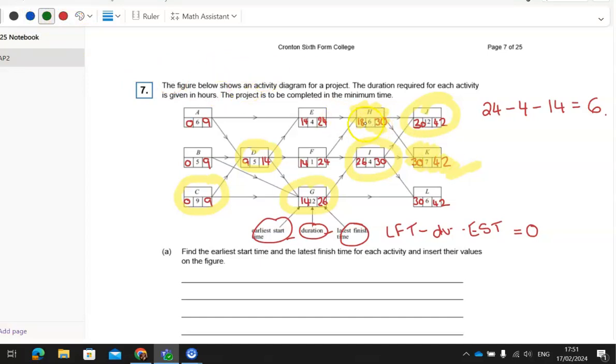Right. So if this overruns by 10, that's now becoming 16. This is becoming 17. So this is going to take 16 now. So the earliest this one can start now is 34. So the earliest all of them can start now is going to be 34, because H, 34, 33, yeah, because that's bigger than the one on the critical path, right? Okay, so the earliest that one can start is 34, and the earliest that one can start is 34.